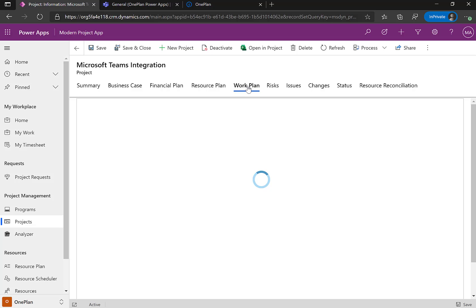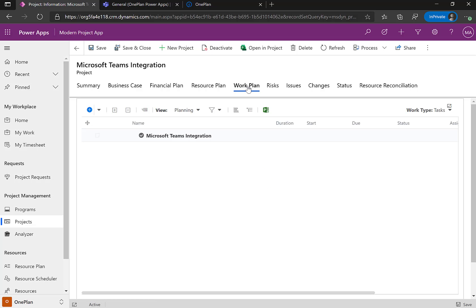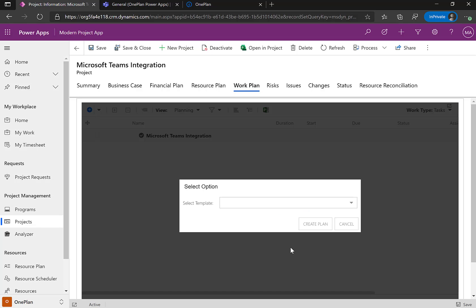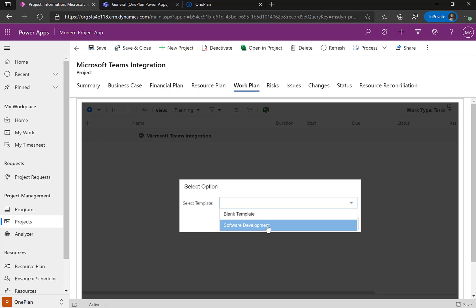Now that the plan is being created, I'll show how you can open it and create either a Microsoft Project for the Web, Microsoft Project Professional Desktop, or even use Office 365 Planner. For this demonstration, we're going to show Project Professional. I can also select from uploaded templates — right now I have a blank one and a software development one — and I'll use the software development template, so I'll click Create Plan.